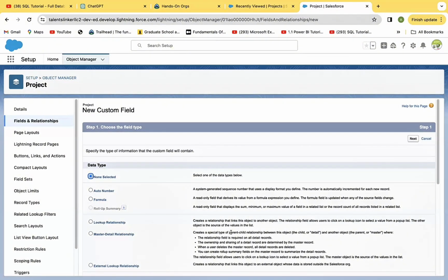So by the time you subtract the actual hours from the estimated hours, you will know the saved time, or if it's lost time, you will know, because the answer will be minus. If you estimated that they should spend 200 hours and they spend like 250 hours, that means it's going to be negative. And if the hours are less, I want it to show a fire emoji or something like fire.